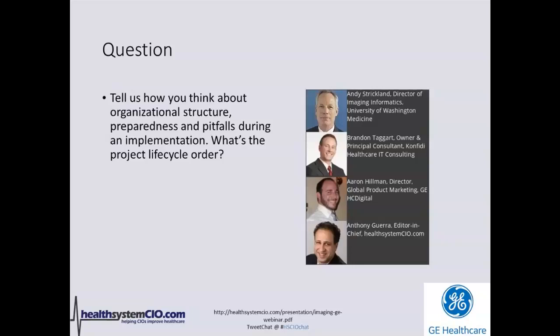From a lifecycle order, when I look at a project, you really want to start with a business case, a charter, understanding exactly why you're doing something. Exactly what Andy stated, trying to get towards what is the financial benefit? Is there an ROI? A lot of times with IT initiatives, there is not an ROI. There may be a qualitative ROI, but not necessarily a quantitative one.